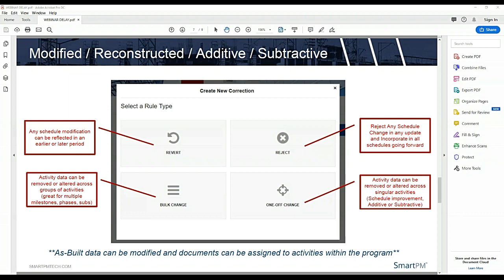We know that the critical path is going to go through the trade, so you need to have that crew logic. And I'll be honest with you, probably about 75% of the schedules that we look at are missing a lot of crew logic. I just know that from our own quality assessments of some of the schedules we've seen over the years. So that's really what we can do with that.